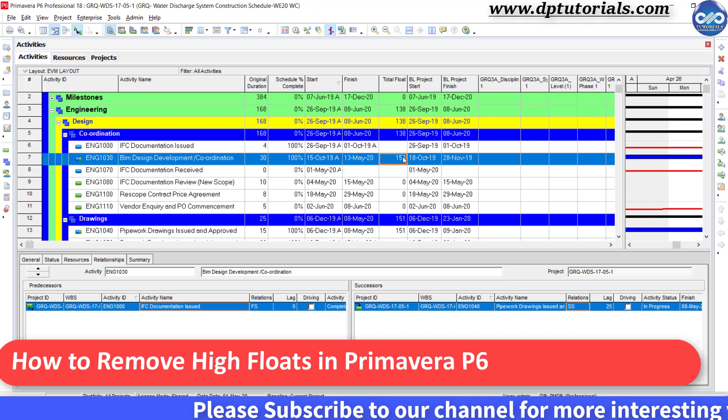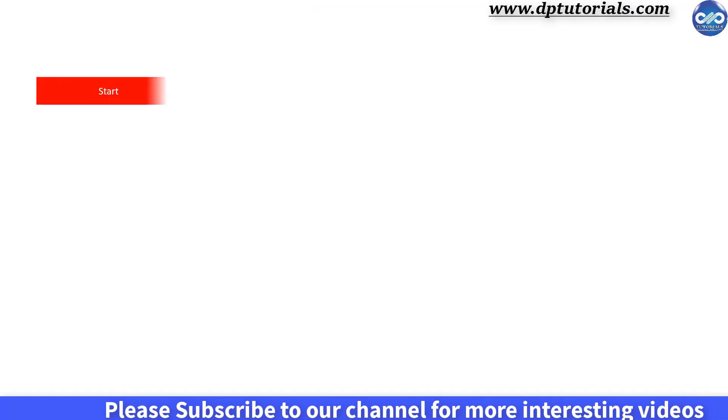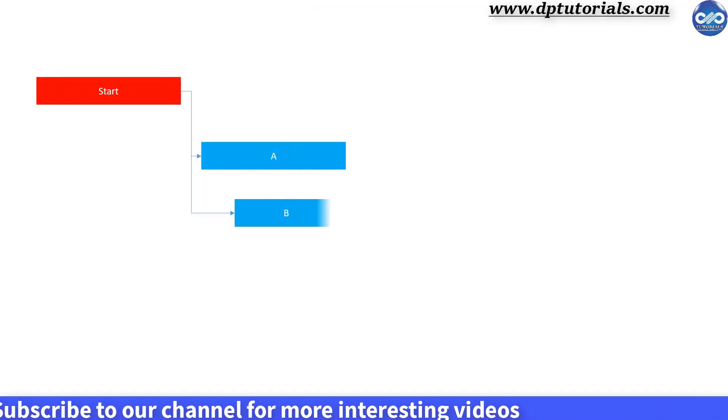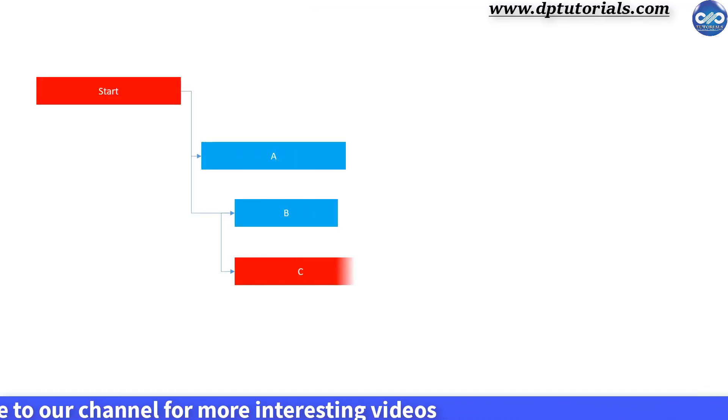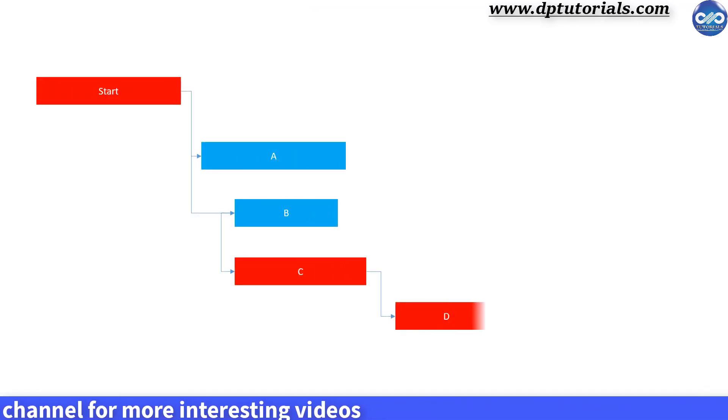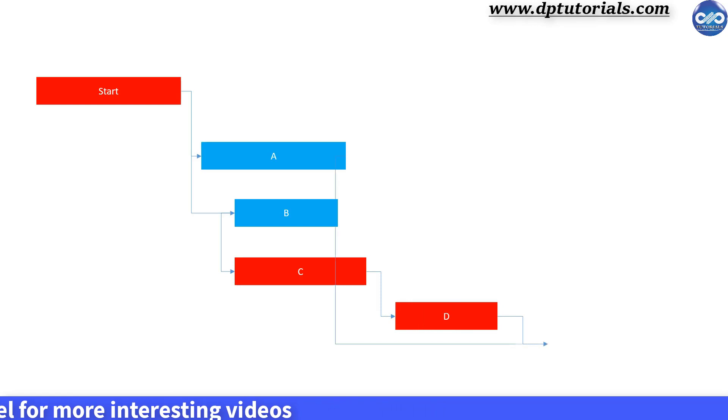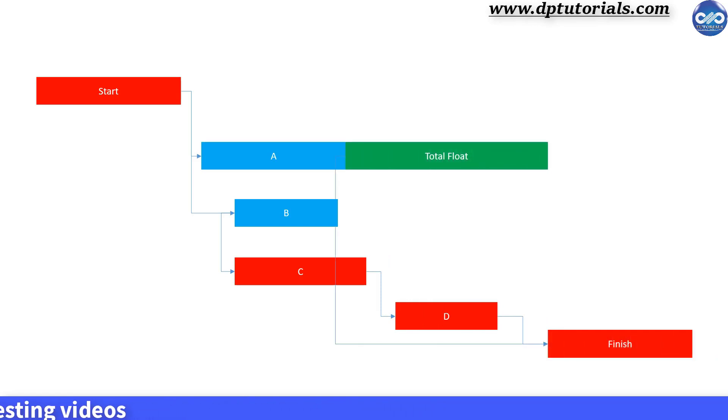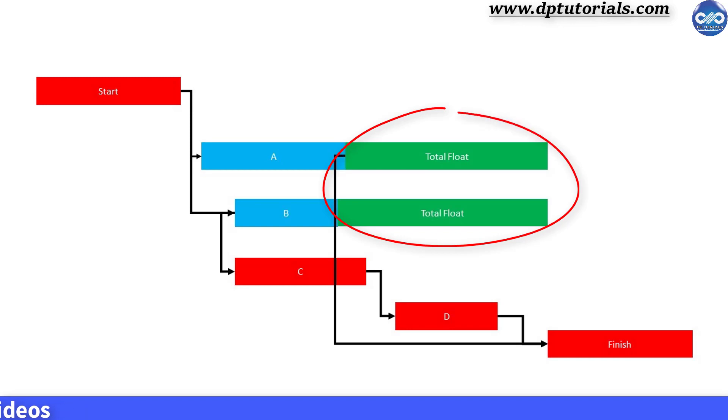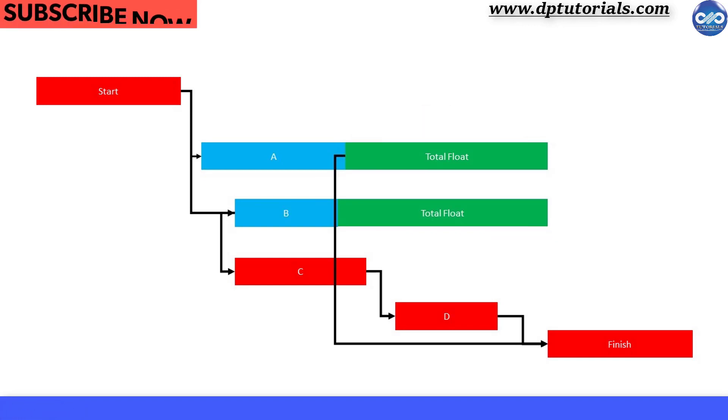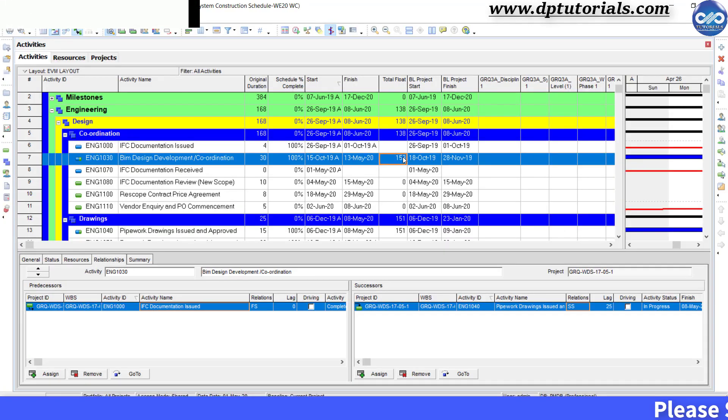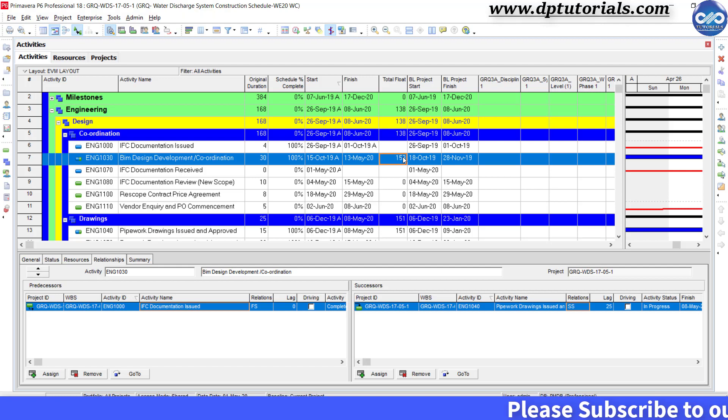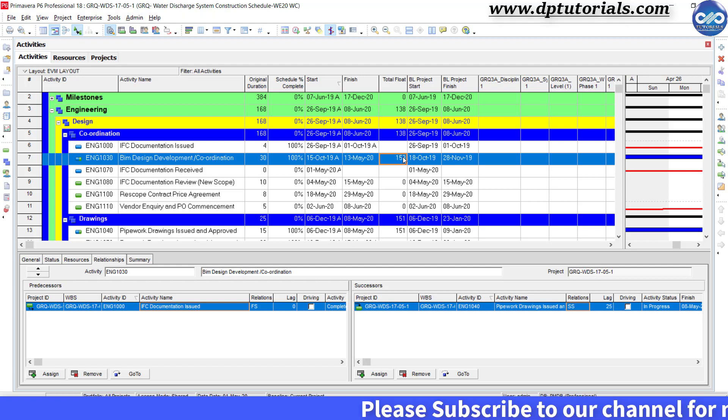What is total float? Total float of an activity is the time that it can be delayed in finishing without impacting the end date of your project. There is a check of high quality in the project schedule to decide the quality of scheduling. Ideally, your schedule should have less than 5% of activities with high float.